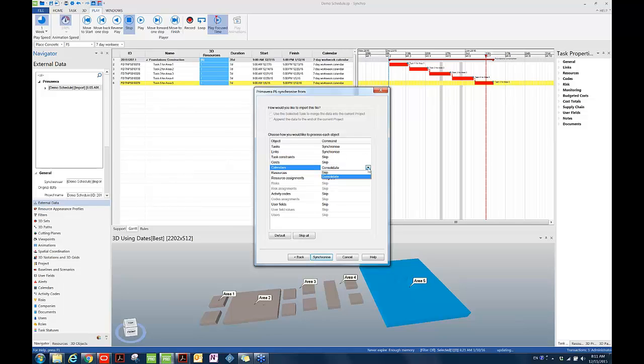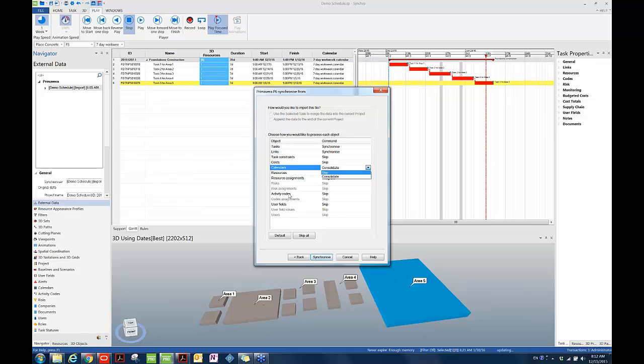We already know from the P6 scheduler that in the P6 schedule, he only added and deleted attributes such as tasks and links. So we can skip some other options that don't apply here, which are task constraints, costs. And then at the same time, we realize that there are only two options, which are skip and costs consolidate for calendars and resources. That is because consolidate is the default choice for P6 global attributes, which include calendars, resources, risks, and activity codes.